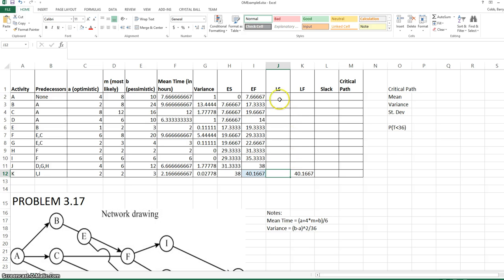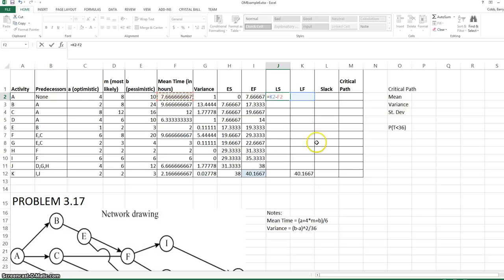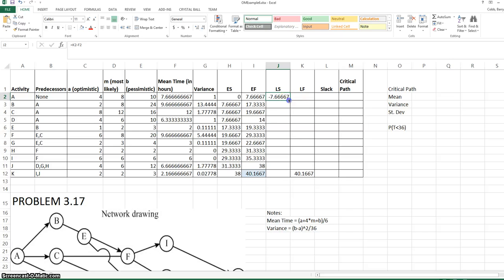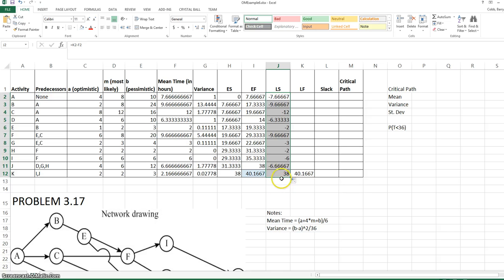The late start for any activity is the late finish minus the mean time. These values obviously aren't correct for anything but the final activity, K.